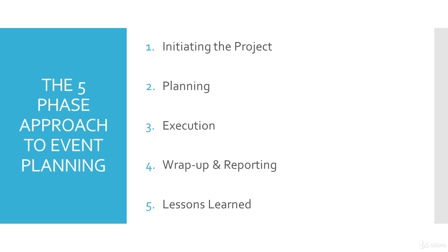Step 4 is wrap up and reporting. Here you will be looking at the end of the event, closing the event, doing your cleanup, tear down, paying final bills, as well as collecting revenue from your client. This is where you'll be sending out your invoices.